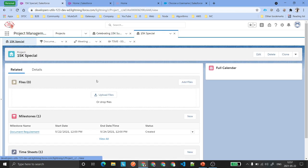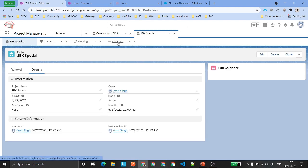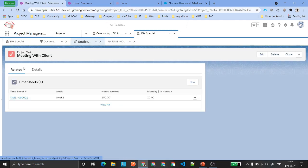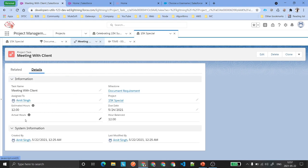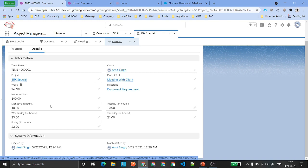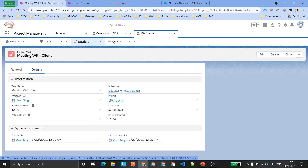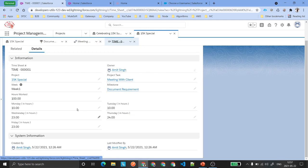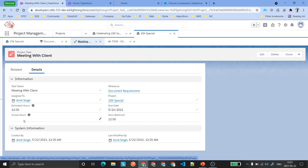That is how your timesheet task is going to look. Once you have entered the timesheet into the task, you can see the actual hours. All these hours are going to roll up to the Actual Hours field — so whenever you create or update a timesheet, that field should also be created or updated.